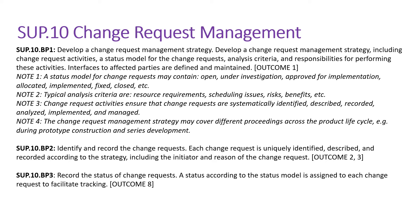BP3 talks about recording the status of change requests. A status from the status model is assigned to each change request to facilitate tracking. The status model will include statuses such as open, in progress, closed, and under review. When a change request is first recorded, it is marked as open; when work begins, it moves to in progress; when reviewed by the change control board, it is marked as under review; when sent to the customer for approval, it is under approval; and once implemented, the change request is closed.